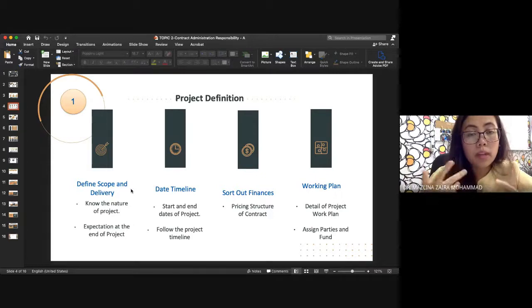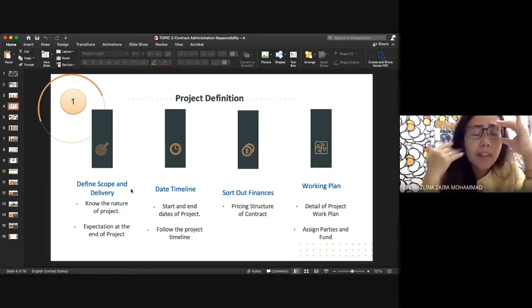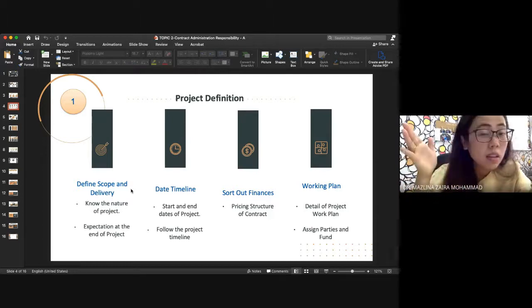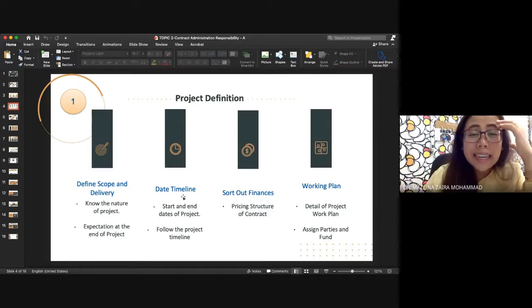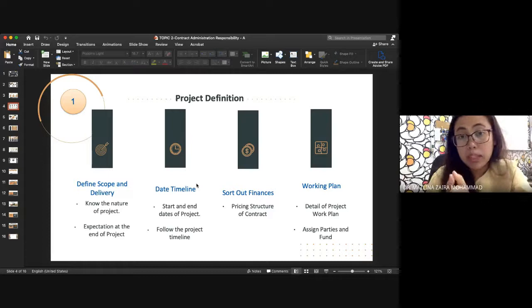If we talk about the contractor, how the contractor has to deliver, they have milestones. Maybe for the first 3 months, or by quarter. Or maybe they have phases in that project. Phase 1, they have to complete within how many months. Phase 2, how many months. So they have to define. And then the timeline, which they already prepared. The client targets, like, within 1 year.